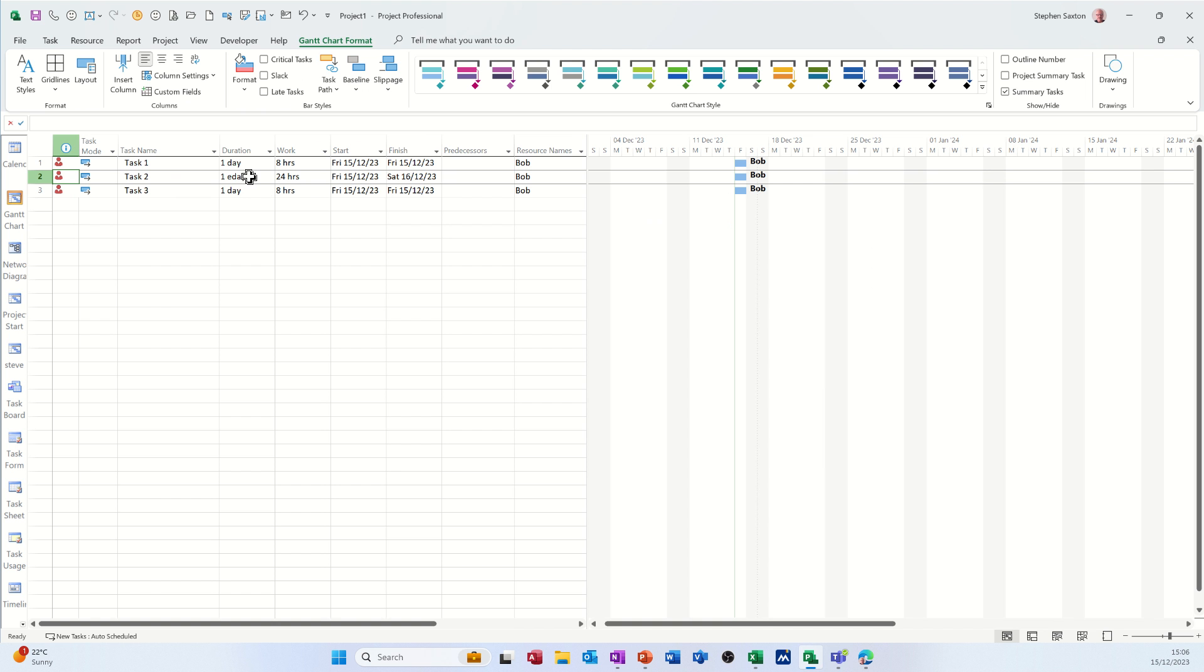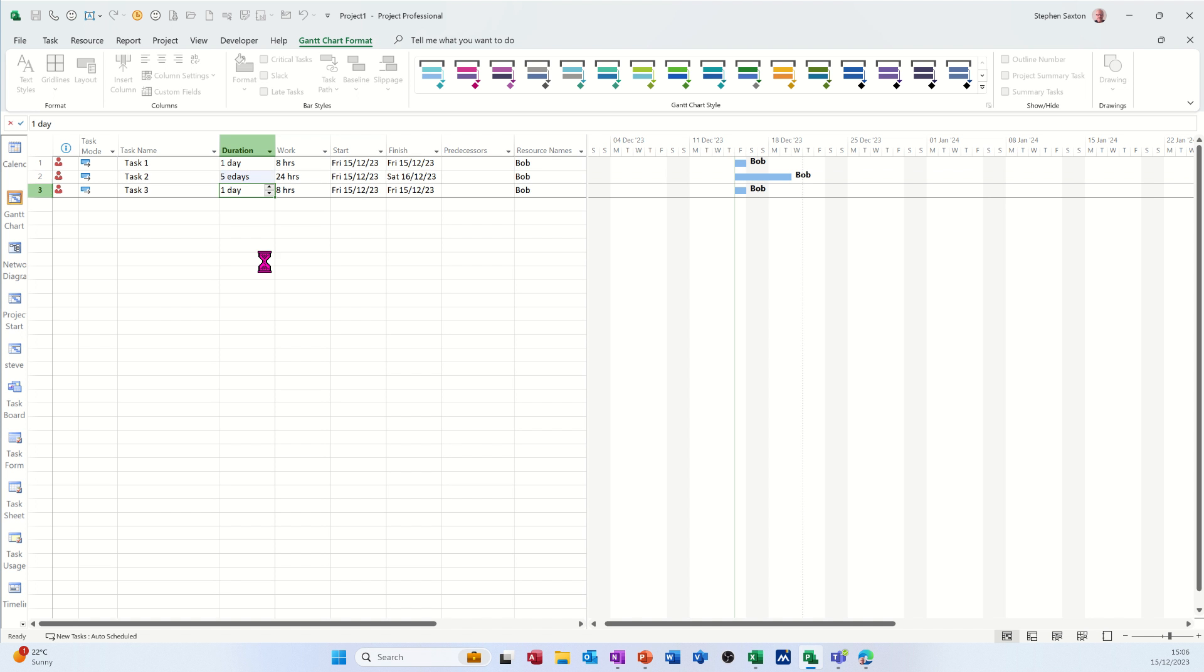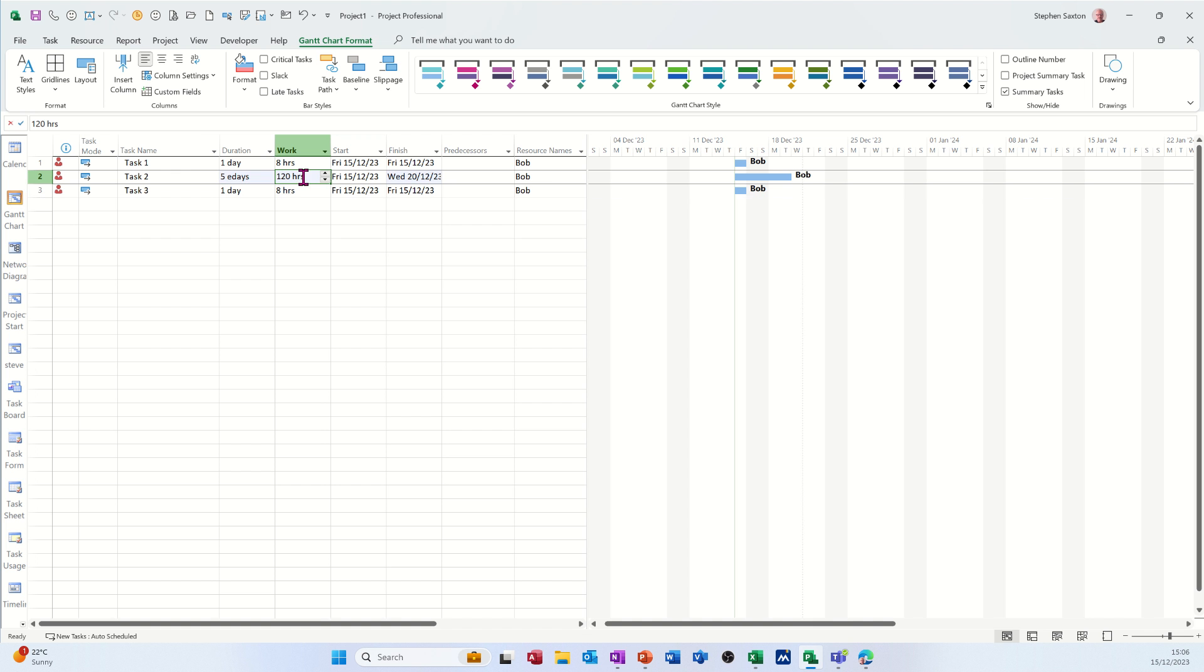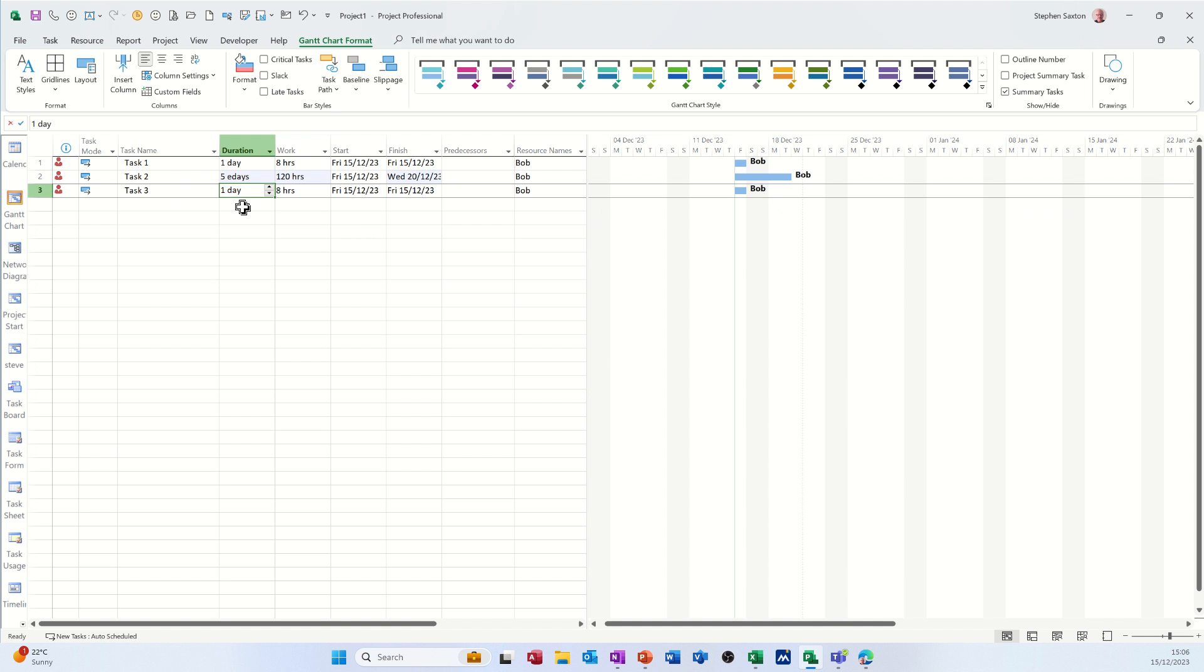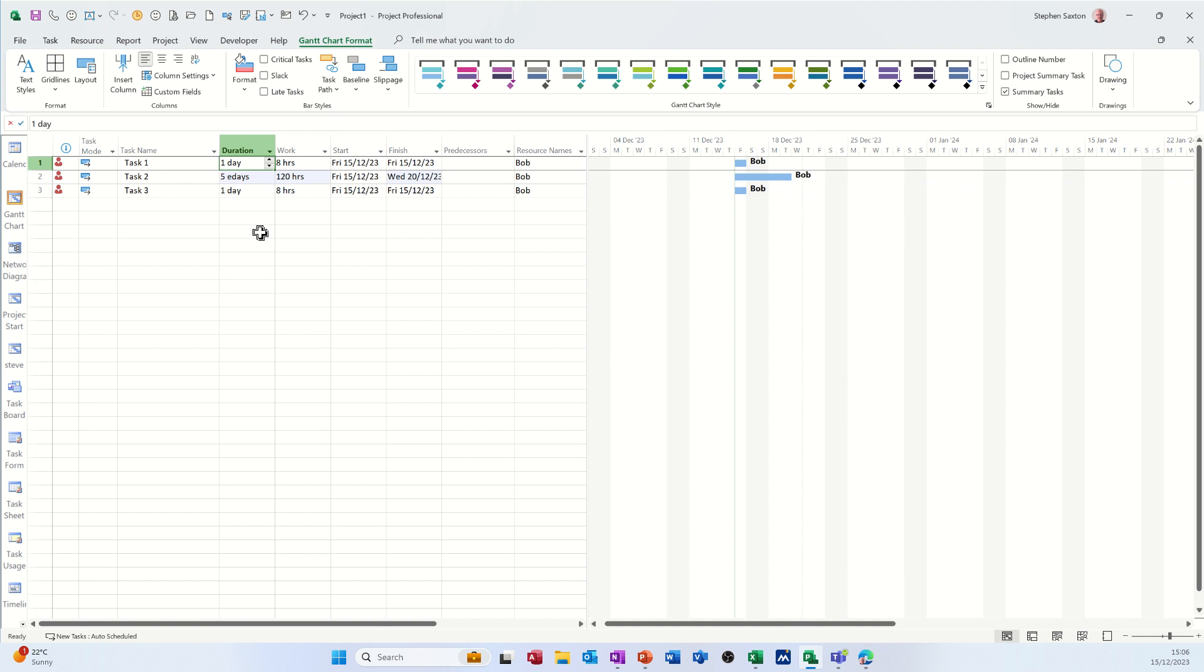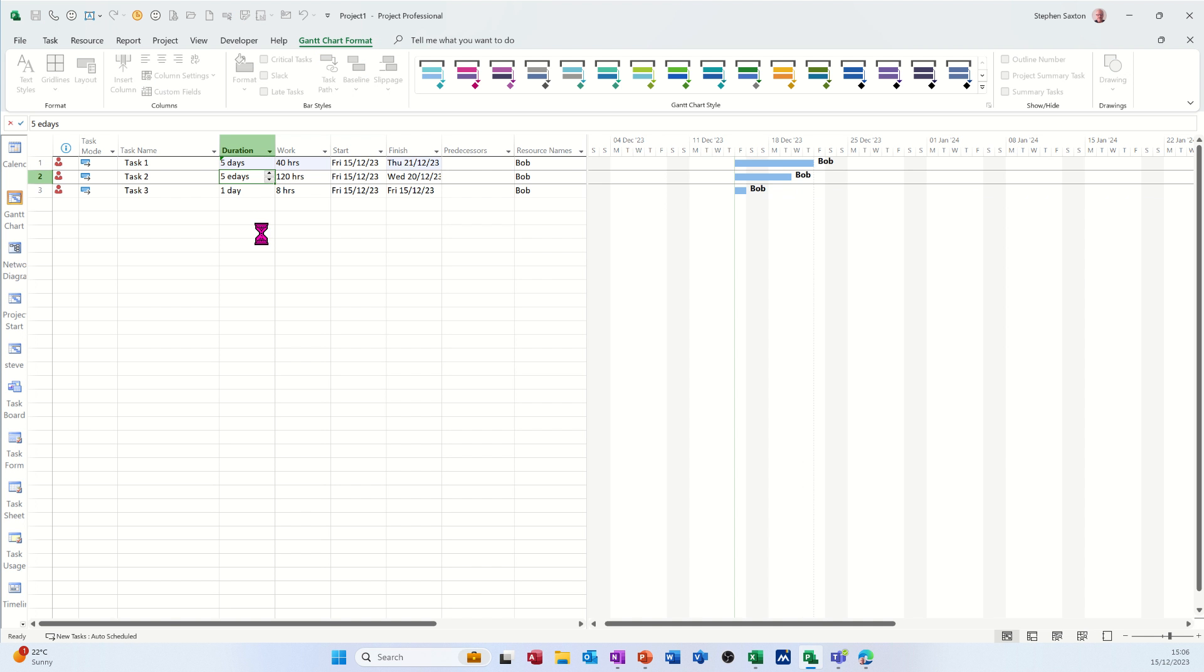So if I go five e days, what happens there? That's gone to 120 hours. Now that's gone over the weekend. Now if I go five days on that top one, five days, that also looks like it's gone over the weekend but obviously it's gone past that.